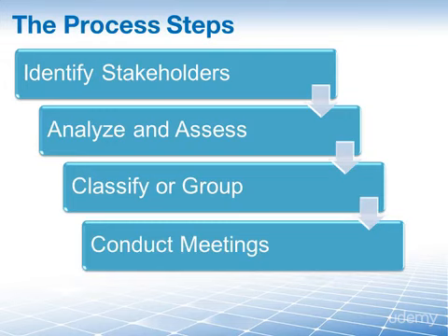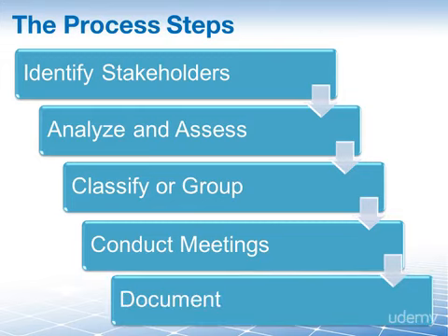If necessary, you can conduct focused meetings, such as profile meetings, where you can gain a deeper understanding of the key stakeholders, such as their roles in the organization or potential role or impact on the project. And of course, throughout this process, you will document the identified stakeholders. They go into the stakeholder register. Maybe you also have a classification or you create a stakeholder map. That information too will be included in the stakeholder register.